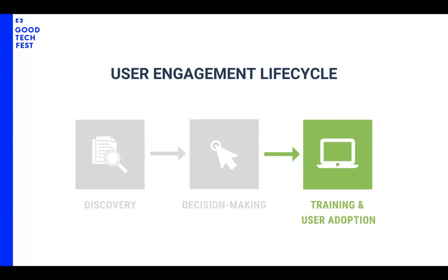So as I mentioned, our end users are community volunteers mainly, and selected teachers from the schools where we implement our programs. So we had to provide a 2-day training, and our training modules cover a wide range of topics, from the use of smartphones, the data collection and sharing process, right up to the technology itself and its functionalities.